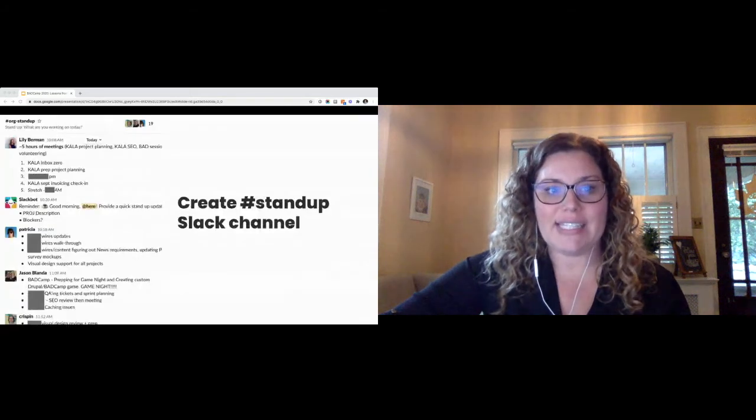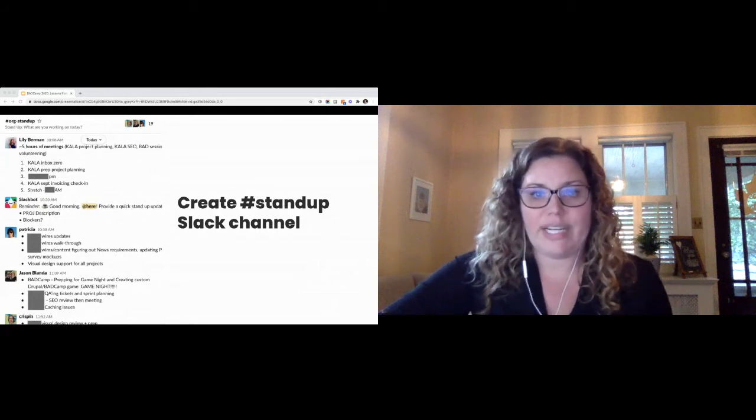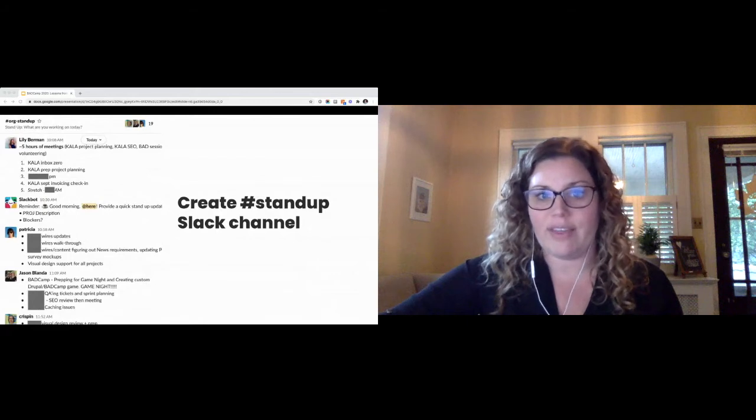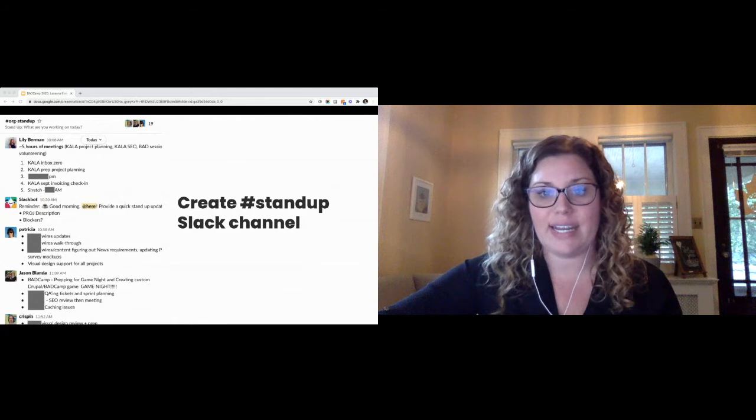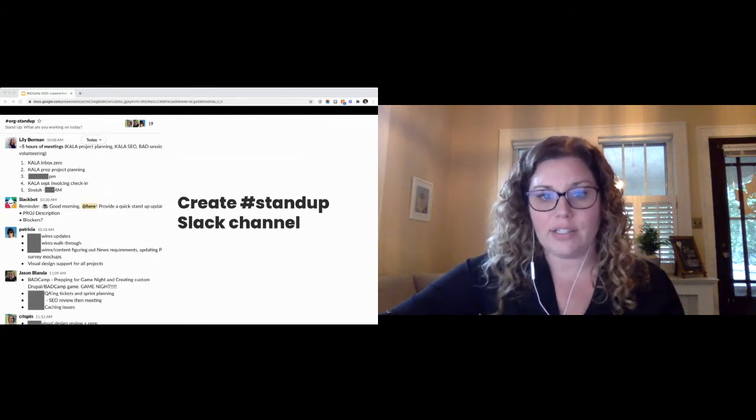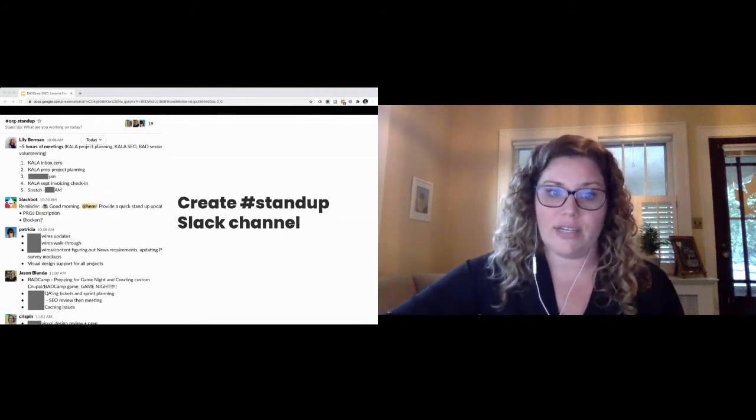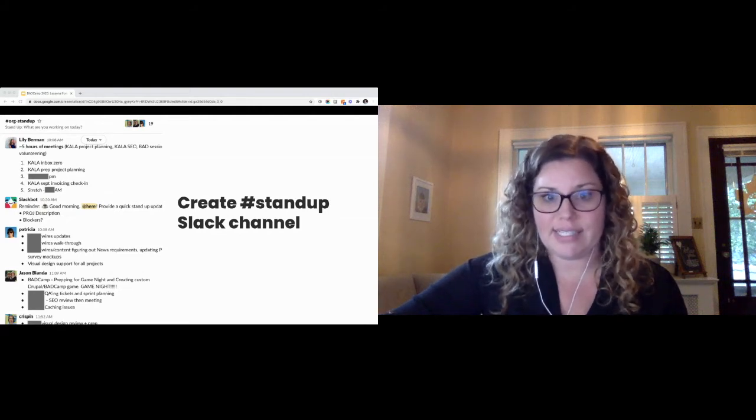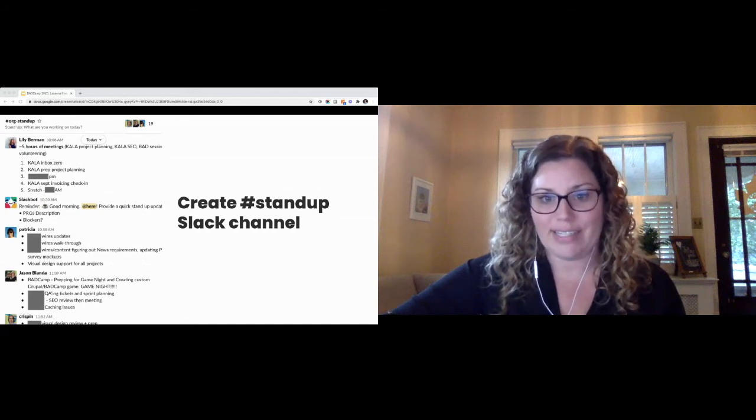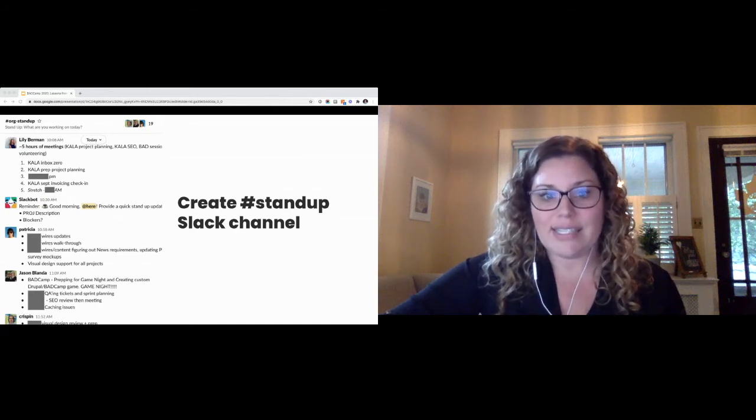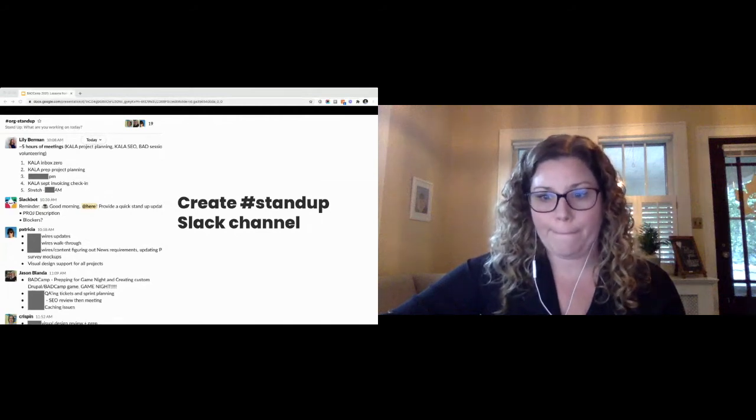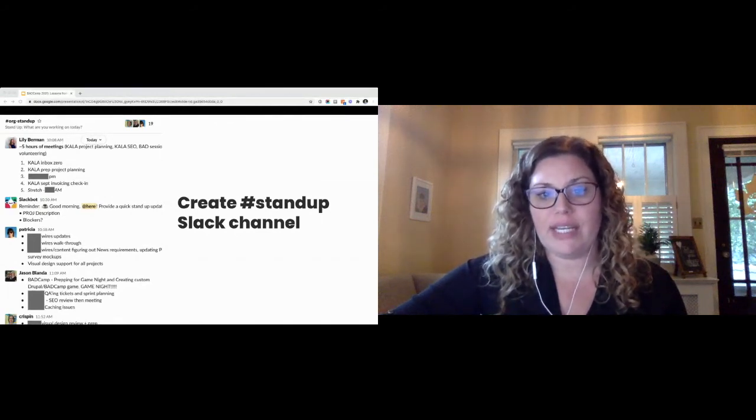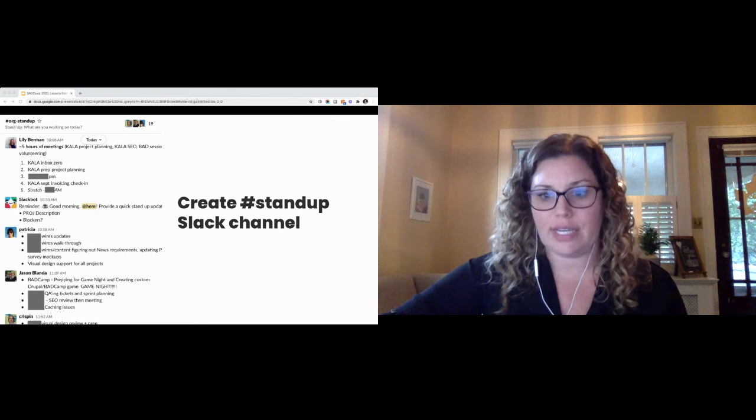So creating a stand-up Slack channel. This has been super helpful. This would be a dedicated channel where each team member posts what they're working on for the day. It's asynchronous, so a team member can post whenever they're starting their day. Time zones don't really matter. And personally, for me, this is how I plan my priorities and activities for the day. It keeps me accountable to what I'm agreeing to accomplish. But as a project manager, I can also check it to see what other team members are working on for my projects and other projects that I'm not managing. For example, I review it to make sure the urgent issue that Mike and I discussed is on his list. And I review it to make sure Crispin is connecting with the design team internally for edits. Our team also does a really great job of posting if they have bandwidth. So, when I see this, I can load them up with more tasks or point them to our queue of internal work that can be pulled into their cycles.